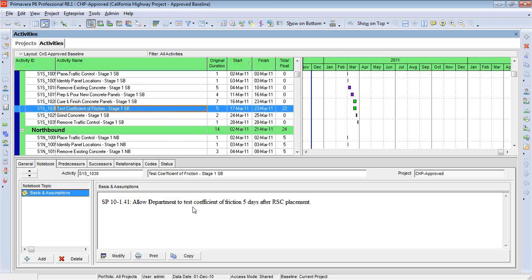So you can see that in this instance, I've even indicated where I found this information in the specifications. So it's a reminder that the five days is actually driven by the contract.